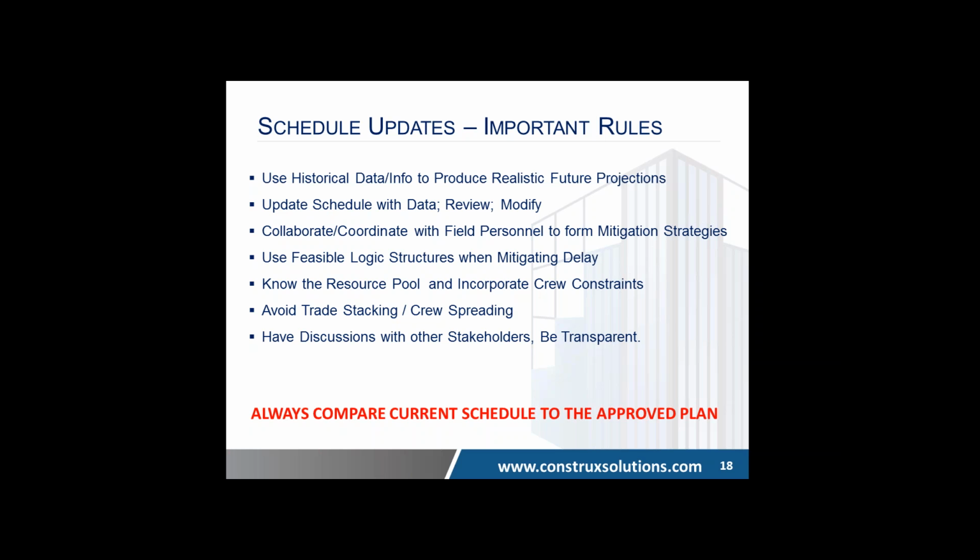It's just like that. Use feasible logical structures. Don't just delete logic to hide delay. That causes problems. That causes trade stacking. That causes crew spreading. That causes impacts to productivity and ultimately delays.